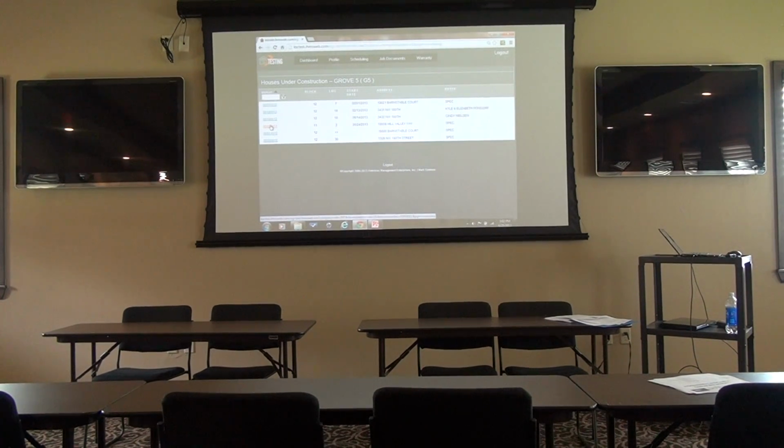The spec houses. Okay, so one of the things that's going to be done to help alleviate that process is instead of giving your POs today before we even broke ground on a spec, we'll hold off and only give you the POs for what actually has to happen, and then have another stage for changes afterwards that'll give you another PO that'll help those.